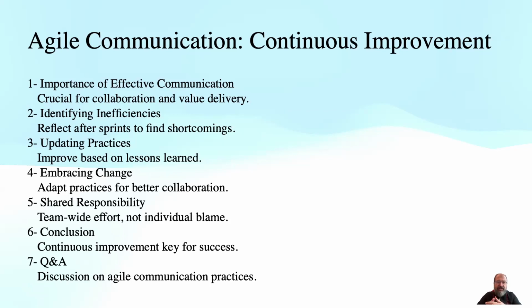Even for an Agile team, having a communication management plan will provide a structured approach to communication while allowing for flexibility and adaptation. This plan outlines how communication will be conducted, what tools and channels will be used, the frequency of communication, and the stakeholders involved. It should also include mechanisms for feedback and continuous improvements.